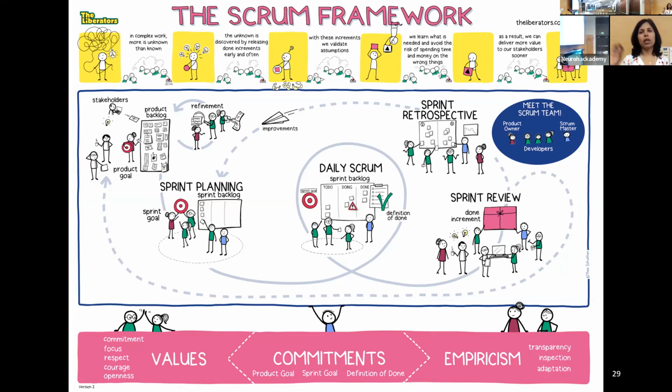So if the dev says, okay, you know what, I don't know, I really don't know, stop pressuring me to give you an accurate estimate, right? Then you use the bigger numbers to put estimates against tasks that have so much unknown about them that it's going to take more than a week to do. And then you help break it down. But for now, as long as the software developer has tasks on their plate to accomplish in 1 day, 2 days, 3 days, 5 days, that's enough to keep the productivity going.